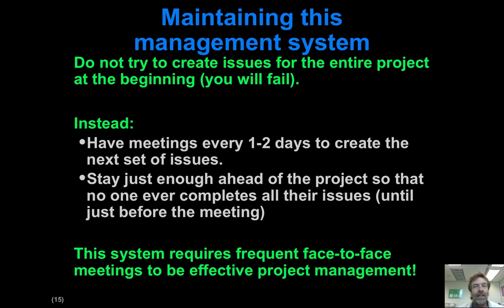So one of the aspects of this particular approach is that it requires the team to get together pretty frequently to manage the set of tasks and make sure that they're good. And in fact, this is not anything abnormal. There's this notion of a stand-up meeting as part of the agile development methodologies that specifies that every single morning you get together, and it should be for 5 minutes essentially, and thus the term stand-up meeting. It's got to be quick enough that you don't have to sit down to have the meeting.